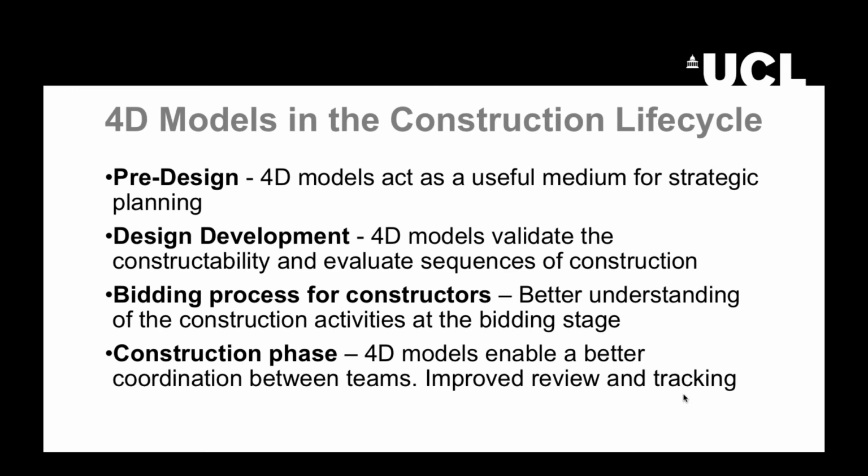In the design development, 4D models are very useful to validate the constructability of the design and to determine the advantages of different activities and different sequences of activities for the construction. Through these models, we can optimize the construction schedule, the different phases in which the construction will take place, etc. It also facilitates communication of the plan to the project teams and different stakeholders.